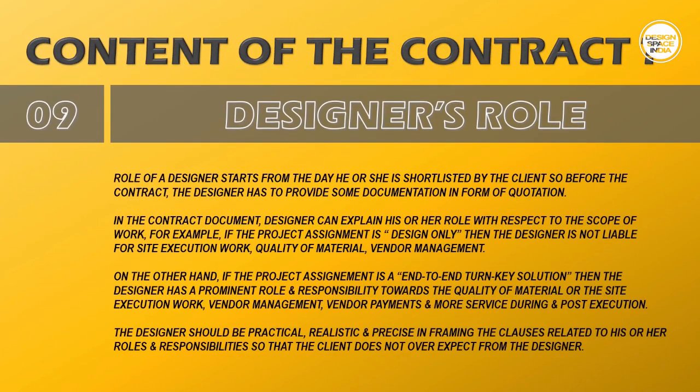Role of the designer is very significant. It starts from the day he or she is shortlisted by the client. Role of the designer can be variable from site to site depending upon the scope of work, site conditions and type of assignment. For example, if the project assignment is a design-only task, then the designer is not liable for any other site execution-related activity. The designer is only responsible to design and deliver the proposal in time.